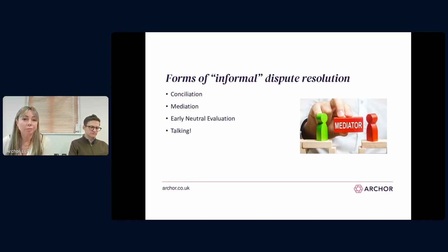Another informal option is early neutral evaluation. Here, an evaluator assesses the facts, evidence, and legal merits of a case or specific issues in the case. The evaluator will provide an unbiased opinion on the strengths and weaknesses of the parties' positions, but the evaluator's opinion isn't binding, so the parties don't need to accept it.